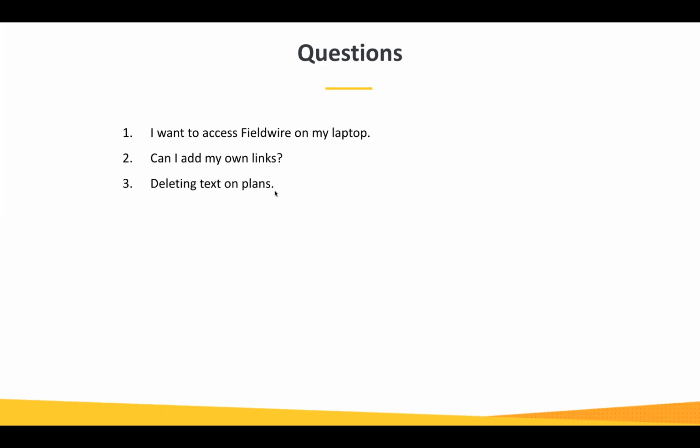Probably for this team here, we've been adding most everybody as admins so that they have a little bit more control to assign other people stuff and mark, because I think one of the biggest challenges was they can't mark it as completed, or that was one of the hurdles. We want the foreman to be able to verify when their guys in the field have finished their tasks. Right. So if they assign a lead or journeyman to do a task, then that person says, "Yep, I'm done," and then it's up to the foreman to say, "Yep, I personally verified it." And now it moves all the way to the right-hand column.